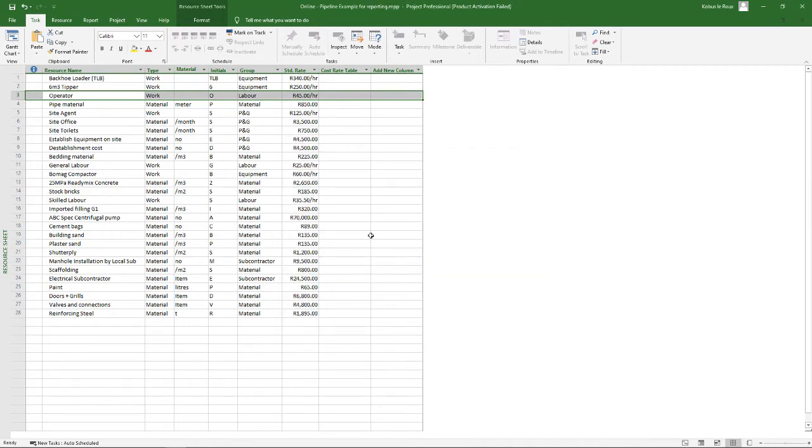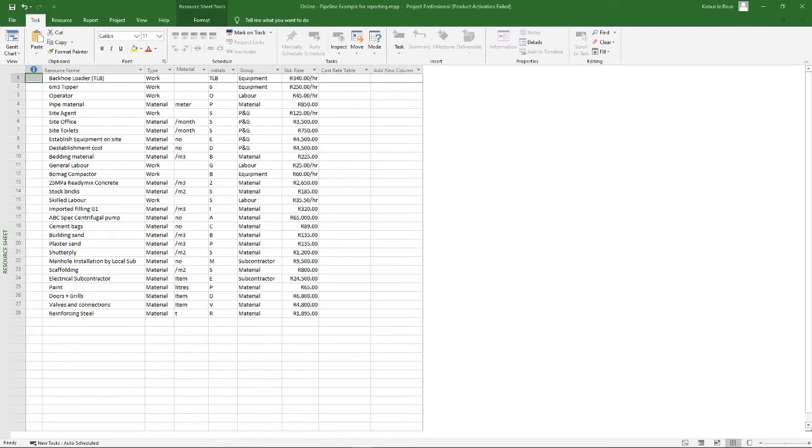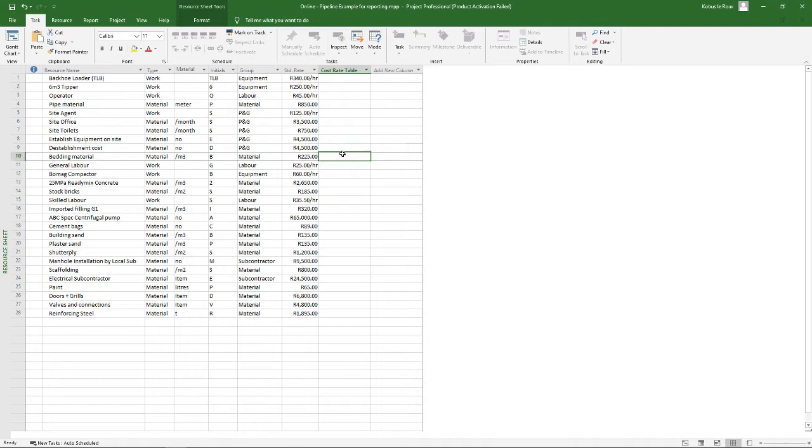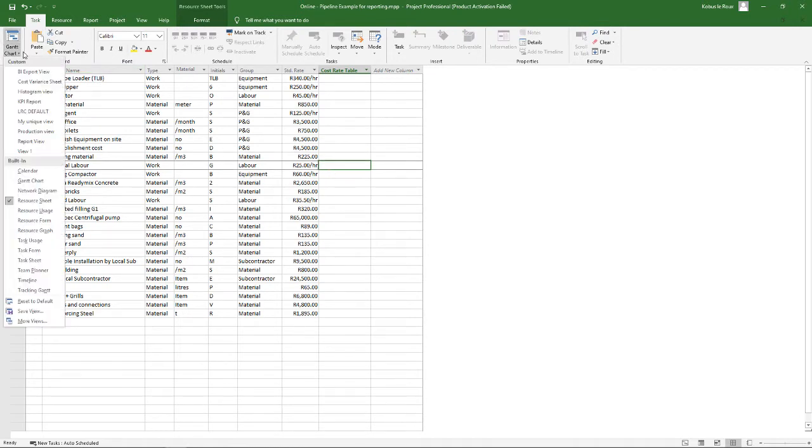Now you'll see it's not always possible to apply the different cost rate table items in any view. So for instance, I've opened up the field over here, the cost rate table, but you won't be able to input any values in that particular cell. So you have to get the task usage or resource usage views.